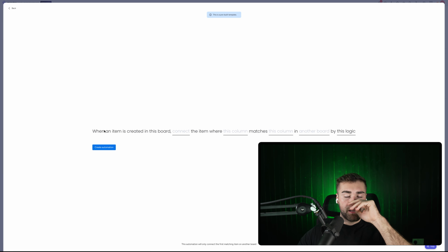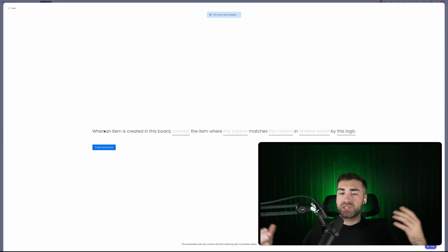We're essentially telling Monday.com that if a submittal is created where the project reference number matches the project reference number of a project on the projects board, then we want them to automatically connect. This creates a relationship between projects and submittals, and then it's really easy for us to track all of the submittals associated with the project, the different stages of all of the submittals. We can then filter by project for those submittals. We can see the stages, we can see everything.